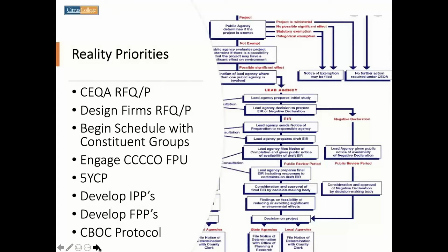All of those plans are the little acronym there, the 5YCP, that's the 5-year capital outlay plan. That lists all of your construction projects that you're going to be undertaking. That has to be reconciled by the Chancellor's Office. There's a formal plan that has to be submitted. There's a lot of work that goes into it. It actually takes a number of weeks to put together.